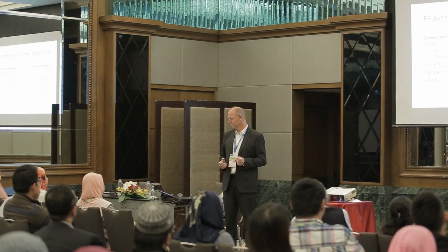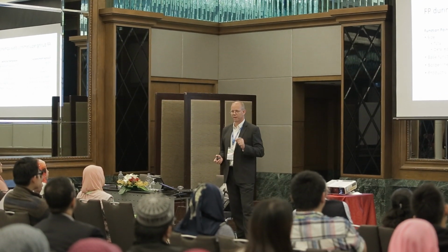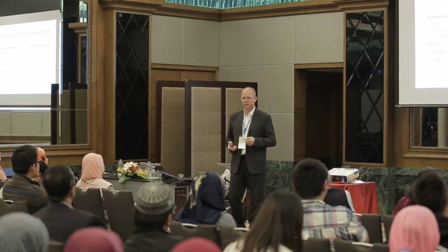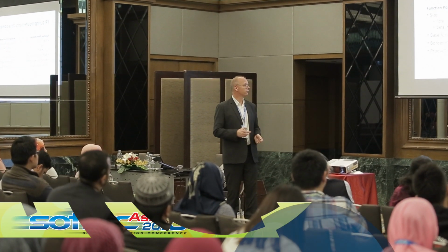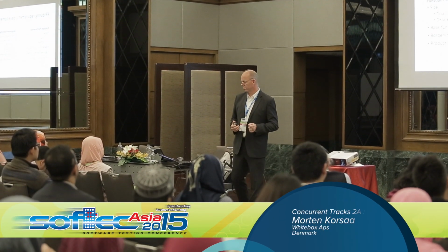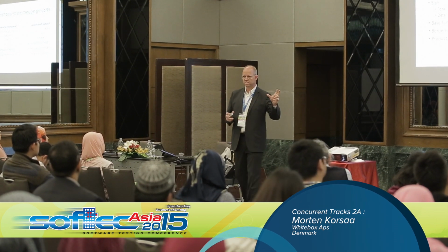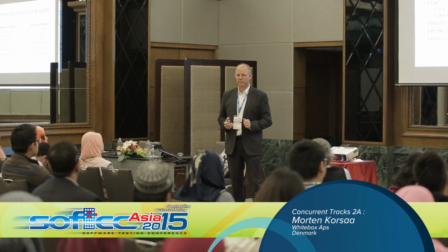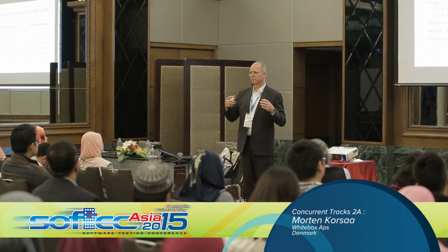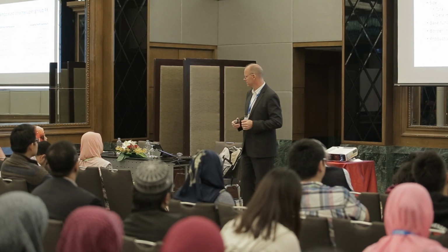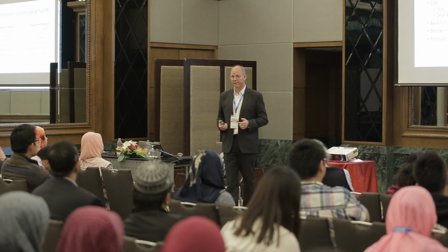Requirements analysis. So the size you get out of this, you have the total size which you'll use for the schedule and cost estimates of the projects. You have the detailed function point analysis, part of the requirement analysis, that will actually go directly into activities.